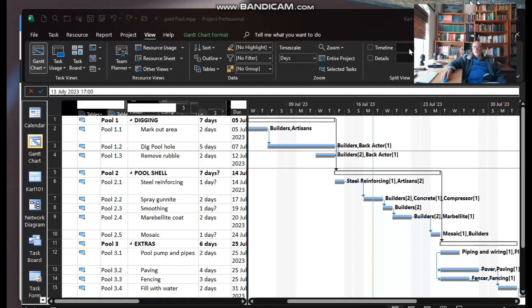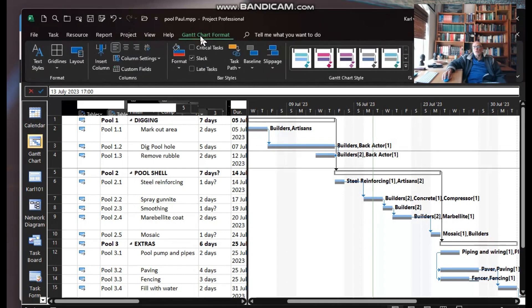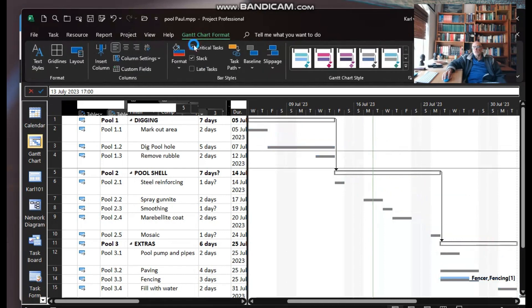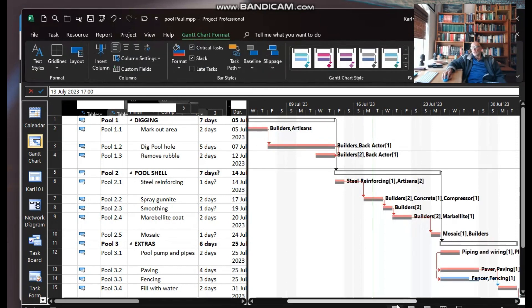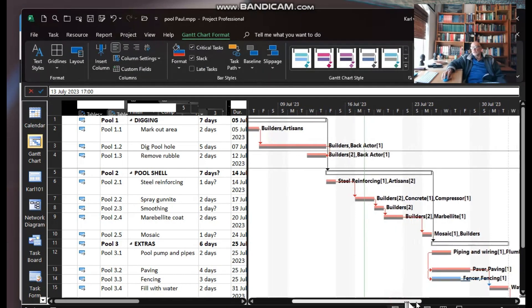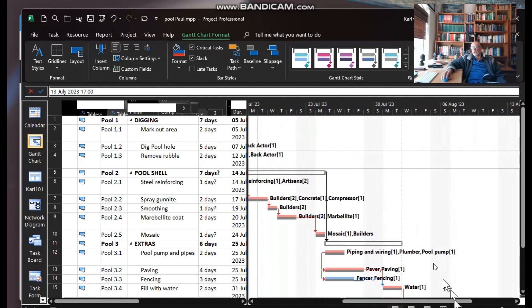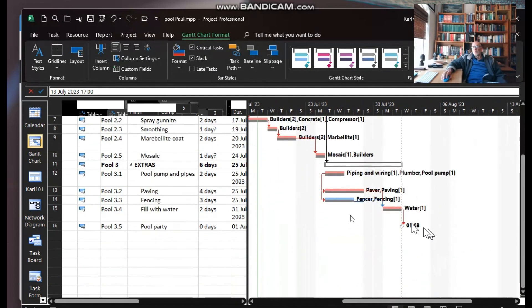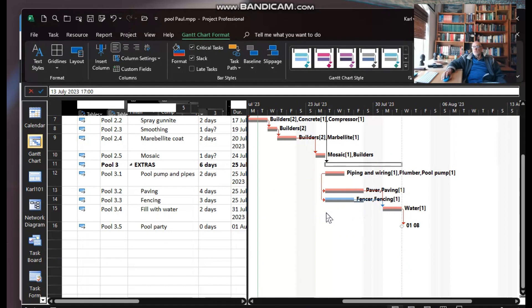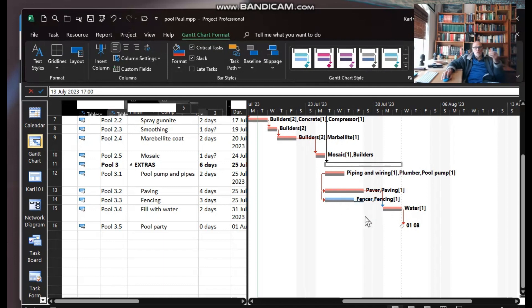So let's first check my baseline and then invoke a little bit of slippage. Let's look at all the critical tasks versus non-critical. There's only one non-critical there. There is a little bit of slack near the bottom here with 3.3, and that's fairly obvious because we've created a branch here and a double relationship, so there is a floating task over here, thus introducing a little bit of float or slack, as the Americans say.